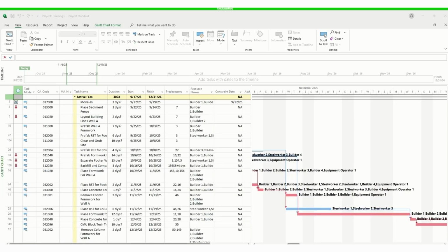All right, after a project opens up, I've already gone ahead and started doing it. But you would change this date from whatever the start date is, if you're going to start earlier, and move it to the day that you're actually starting. So I'm putting that we started yesterday, 17 September, for this training.